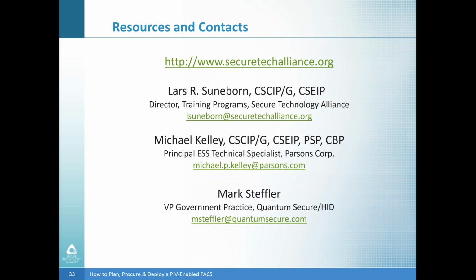Thank you, that's a good one, Randy. There is suggested procurement language on the idmanagement.gov website. It talks about the requirement of using APL listed equipment and certified service providers. That is a requirement in OMB A-130, and it is in the GSA procurement language.